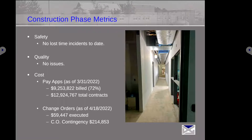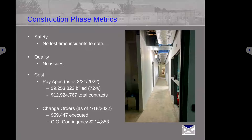On the bottom you can see the change orders — that's as of yesterday. This number down here has been shown as a negative because of all the backwards movement in the beginning with the VE items, getting some money back in our contingency. We've now surpassed and we're dipping into that contingency now. It was $279,000, and that's because we just brought in the changes for that alternate ten bathroom across from the main office.